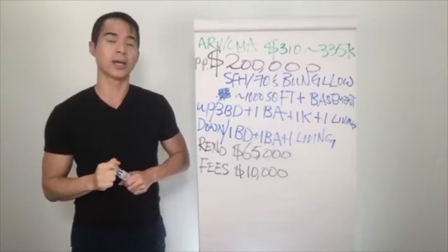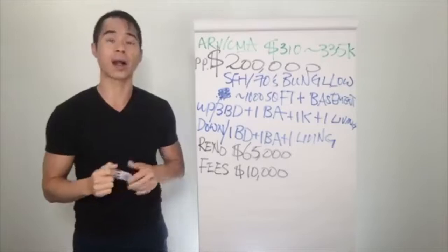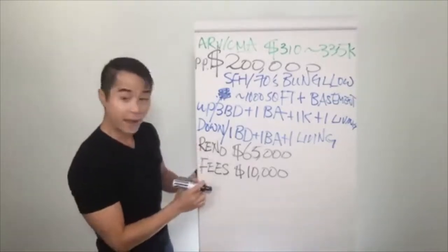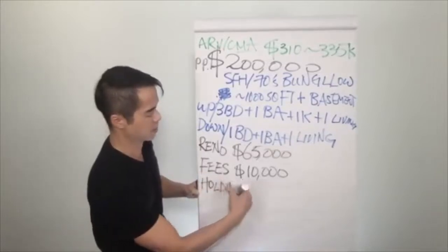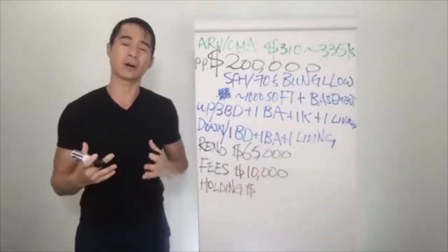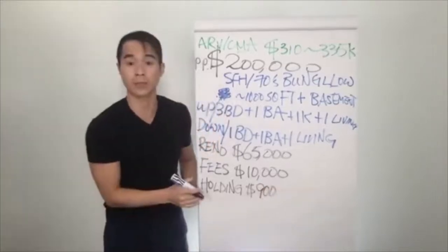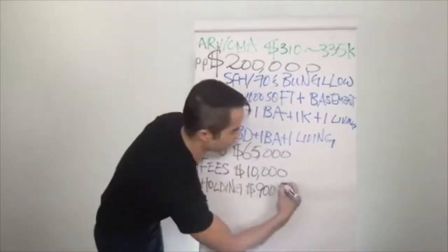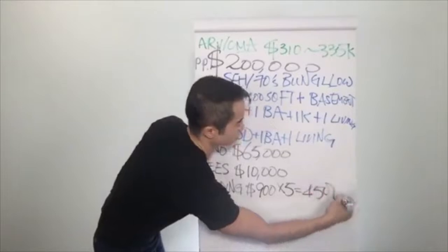$10,000. Okay, it was a little bit higher simply because we did some creative financing structure with our money investor into the deal, and then afterwards, what we had to do is make sure that we count the holding cost into this. And on this particular property, yesterday I shared with you about $800. On this particular property, it was $900 on a monthly basis for holding. And in total, this was actually a 5-month process. So this was $4,500 right there.